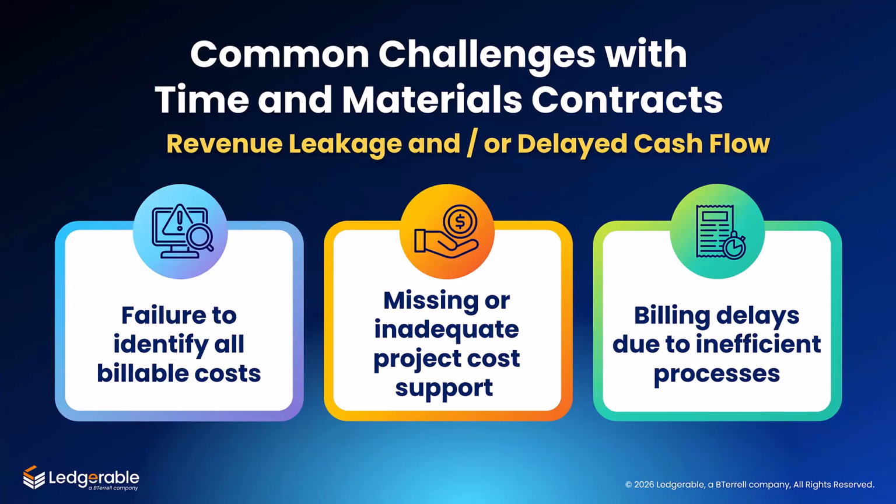One of the biggest problems or headaches for contractors with time and materials projects is the failure to identify and bill for costs on a timely basis. When unbilled costs are discovered after the normal billing cycle, it can cause embarrassment to the contractor and a loss of customers' confidence. In the worst case, untracked costs may never be reimbursed, damaging the project's profit margin.